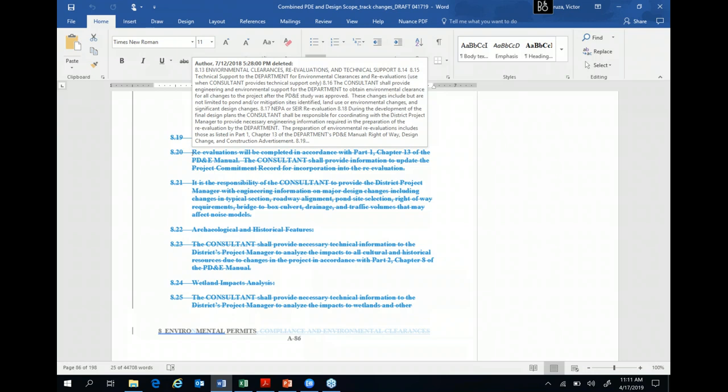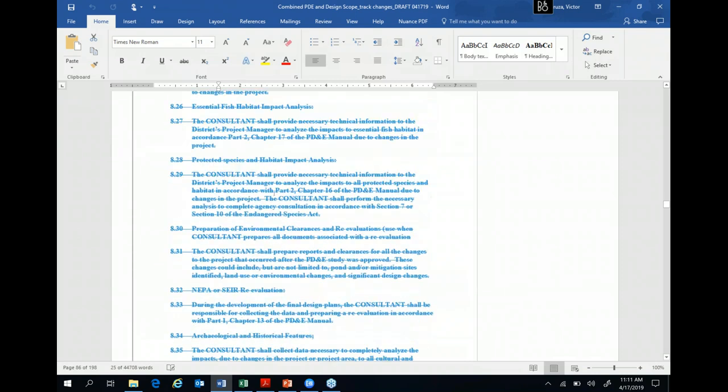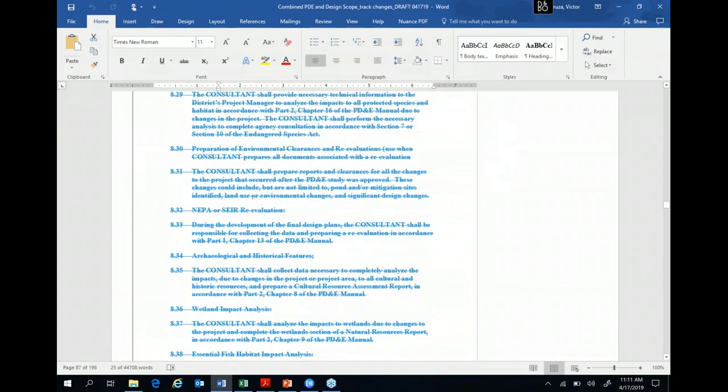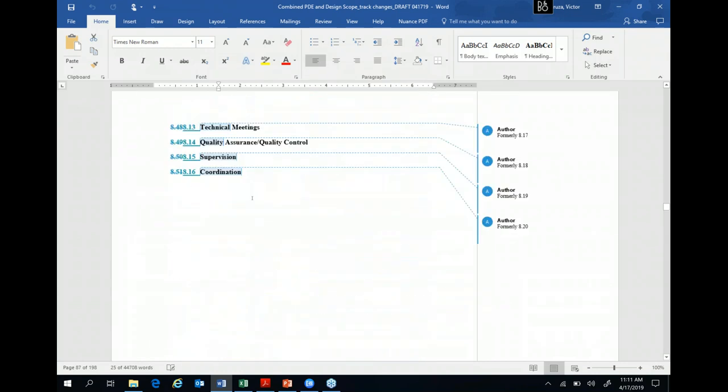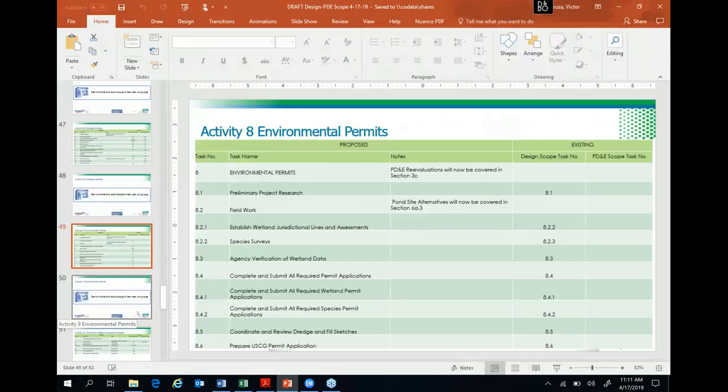Our guidelines say you can move to a later phase within 1 year of our LODCA. Even construction, if it's within 1 year, talk to our office, then we can clear that environmental reevaluation quicker than we do now for those PD&E projects which have been on the shelf for many years. So, no structure change there, other than a little clarification. The biggest change now comes into 10.